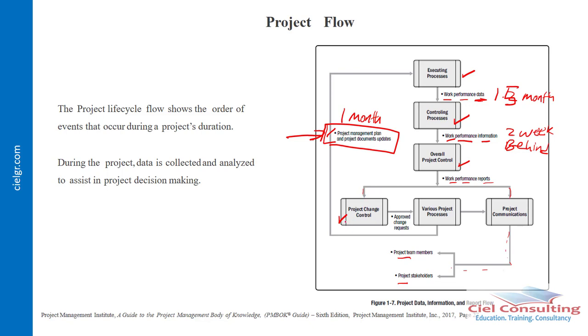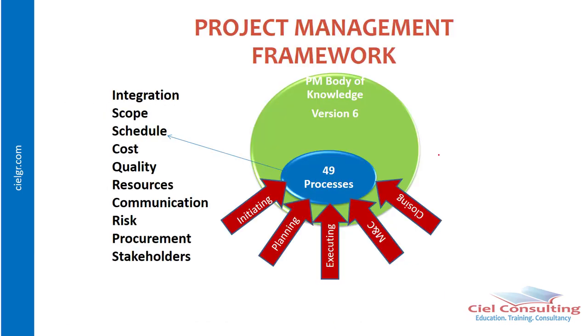All of these are now going to be addressed via a change control process. So if the change request is approved, then of course we now need to go back and update any document that the change will affect, which is part of the reason why you're seeing project document update as part of the output here. And then the approved changes will also be communicated to relevant stakeholders, including the project team as well as other relevant stakeholders. And then again, don't forget that these approved changes would have to be replanned and then of course implemented, and we run through this cycle again. So this is typically how these process groups interact with one another in the course of the project implementation.